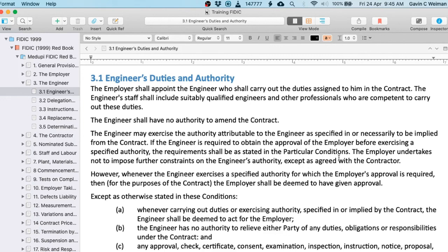And it doesn't say that this agreement must be provided for in writing, but I would strongly suggest that you put that in writing, because you would need that writing to prove you have not breached this clause if you are the employer or the engineer. If you have breached this clause, or you've breached the sentence above it, it could be argued that you have fraudulently acted behind the back of the contractor, and this is also a breach of contract.